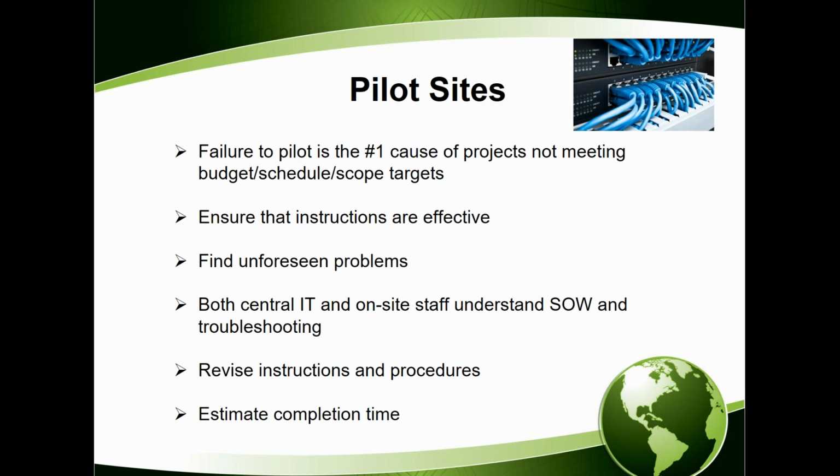They would have had some time in between the pilot and the full rollout to make some adjustments, and it would have gone a lot more smoothly, and the business unit sponsors would have been happier with it. So it helps you find unforeseen problems. It also makes sure that your central help desk staff, as well as on-site people, understand the SOW and the troubleshooting. Again, you can revise the instructions and procedures before you roll it out. And of course, the other piece of it is that it helps you really accurately estimate your completion times.